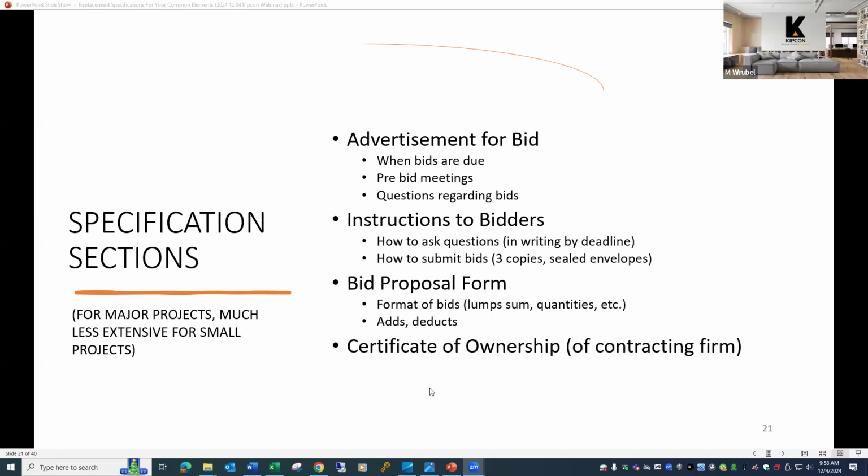So in the unit price section, there would be a cost for square feet of sheathing replacement. So if that does occur, if it's determined that is needed as approved by the engineer, then there's a cost in there for that already. It's not a surprise cost. It's a known cost per square foot that the owner would be responsible for.